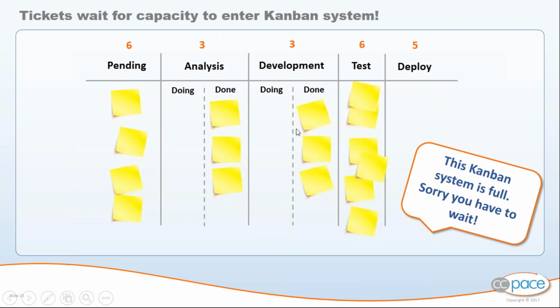In this setup, people will not be overburdened, they will not be multitasking, because what's the easiest thing for development and analysis people to do when their work is done and they cannot pull it downstream? Well, we're going to start something else. Whenever you're stuck with no work, what is it that you're going to do naturally? Hey, we'll start something new. And it's not the right approach. It will just overburden you.